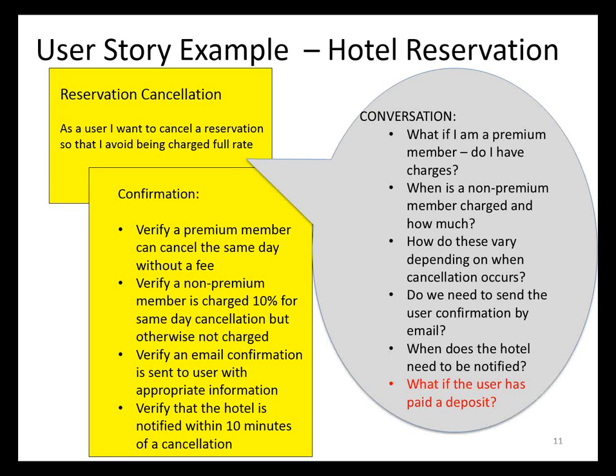We could separate them out. So there's lots of ways and patterns to decompose stories, because the thing we need to remember is that a story is an increment of development, told from a user perspective, but it's an increment of development, okay? Thin sliver of functionality. Ideally, that covers the various layers in your architecture. Ideally, we start with these functional, non-functional stories.